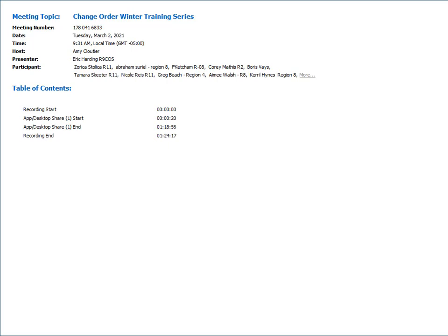If a master mechanic or maintenance engineer are not shown in the payroll, does that mean that they are not included in an agreed price or force account work? If they're not shown on the payroll, you don't have proof that they were paid and you don't know what rate they should be included on the force account as. If they're being included on force account work, they sure as heck need to be included on the certified payroll.